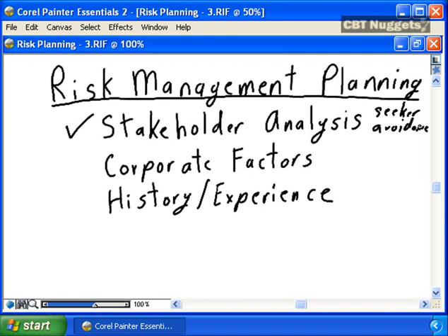While that is true, there will be instances where projects will want to take on risks to ensure the project achieves the overall organizational strategy. If the project is initiated to develop a new product, or a breakthrough approach, allowing the organization to deliver a new product or service to differentiate their product or service, that project should be a risk-seeking project.